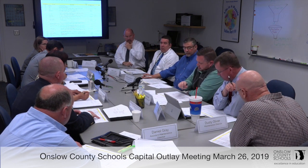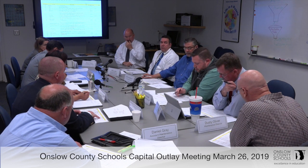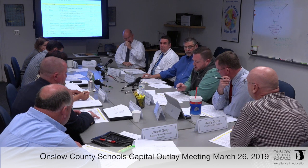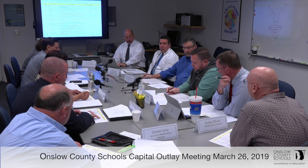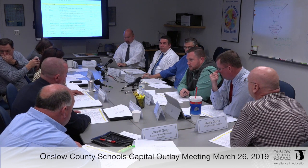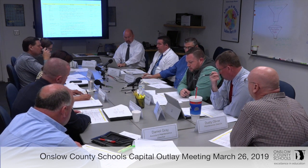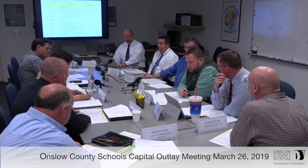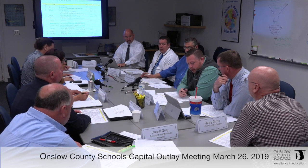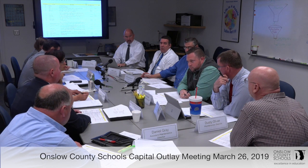So the in process, I kind of took this as two different requests. Fix the damaged ones, that's from the hurricane, that's in process. The additional more cameras would be about the 10 grand mark. Most of his cameras are all inside. Not a whole lot. How much is an individual camera? I say average about $1,000 a camera by the time you pull cable, labor, that type of thing.